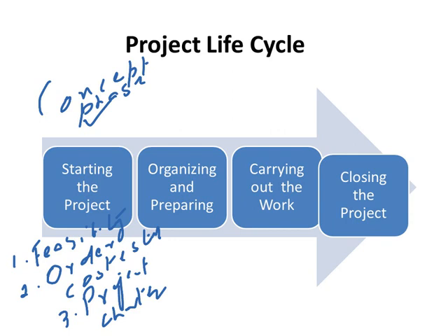The second phase will be organizing and preparing. And the deliverables from this phase will be scope statement, work breakdown structure, and a schedule baseline, and also budgetary cost. The third phase will be carrying out the project. The fourth phase will be closing the project.